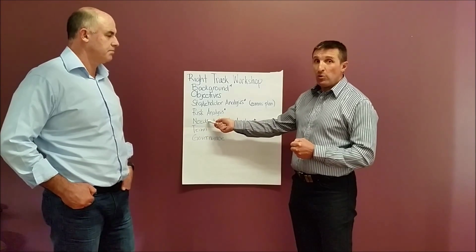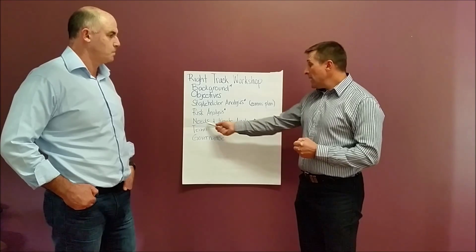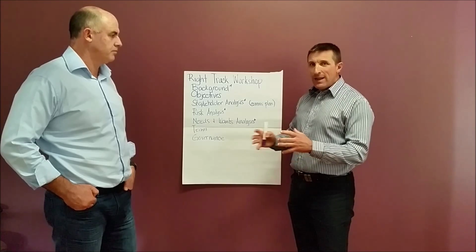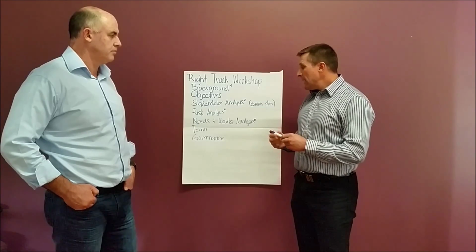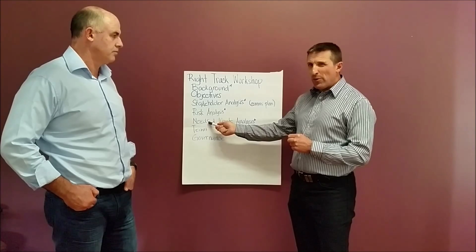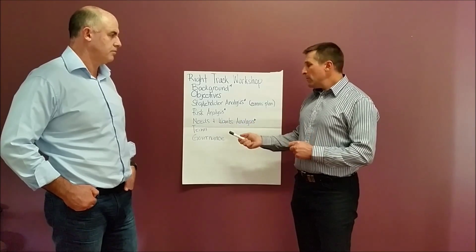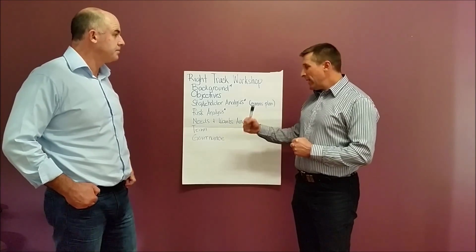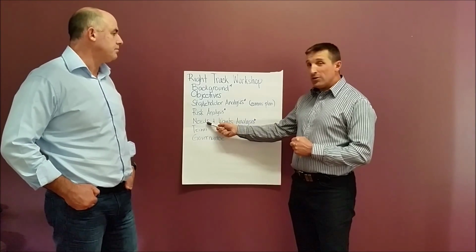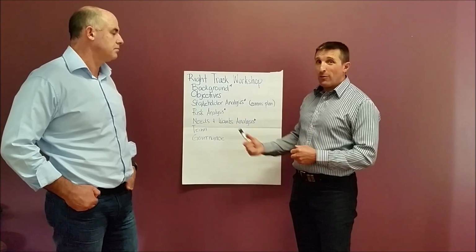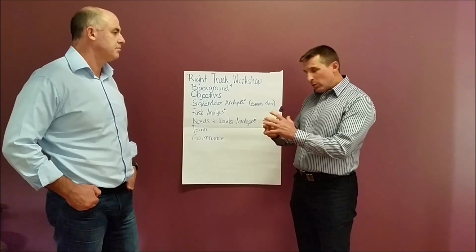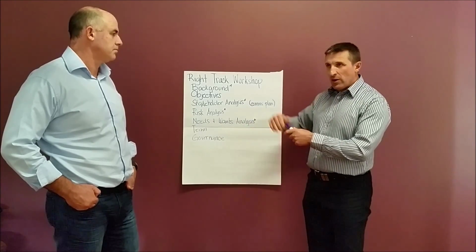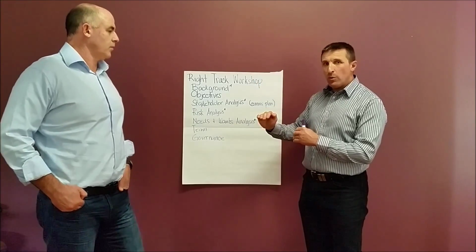And I guess this is what I used to do before I developed the Right Track workshop. So it's a needs and wants analysis. So what's that? We're looking at what this client wants and what they need around this project. And so the first thing I've got to do is brainstorm with them, typically on a whiteboard, what do they need and want out of this project? Then we've got to wrestle out of them, this is the trickiest part, what is a need and what is a want, because typically they think they're all needs. And there are some little techniques for that, but once we've done that, then we can rank the wants, just right from the most important down to the least important.